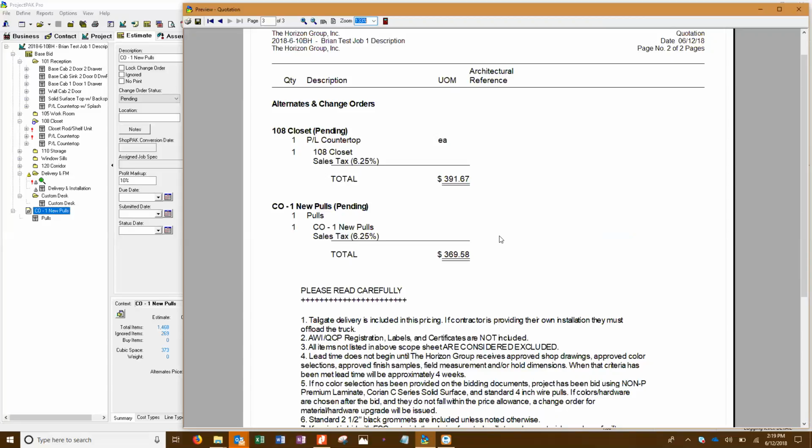So, maybe you put in there, when it is a taxable job, that this job includes tax, if you know that at first blush. If you don't, then I would put in my exclusions something about we do not include tax, but if the job is taxable, we will add tax at the end. Because you talk about the certificates there, if you're a non-taxable job, then you need to include a tax exempt certificate. So, something like that.